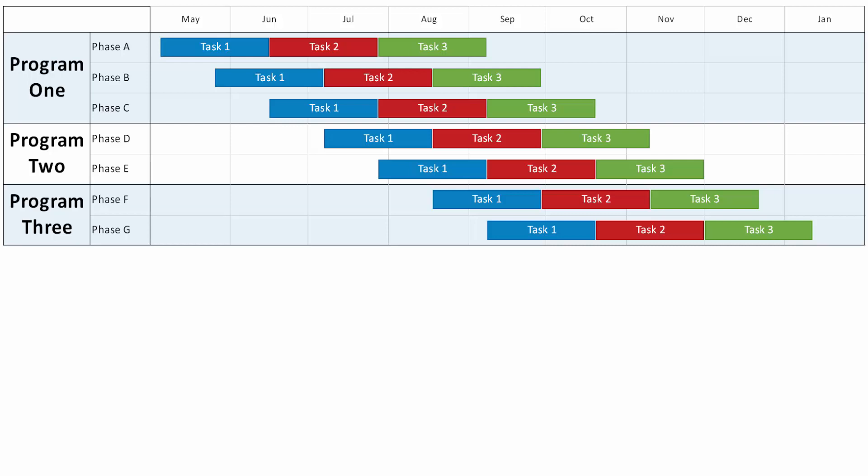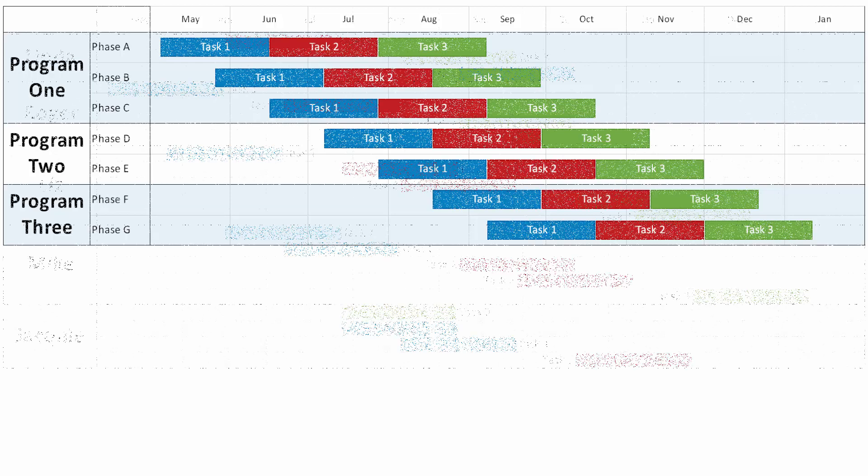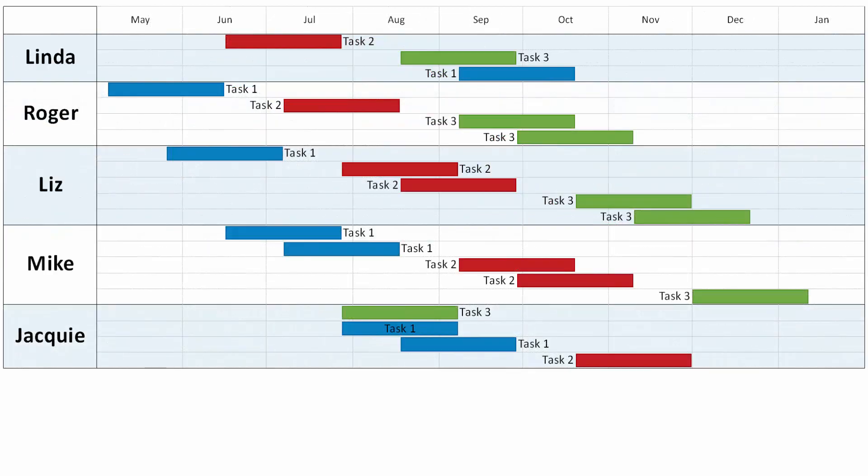Here, we've added a swimlane grouping to the first example. We can regroup the same chart based on resource, so that every task, and therefore every row that's assigned to that same resource, ends up in the same swimlane grouping.